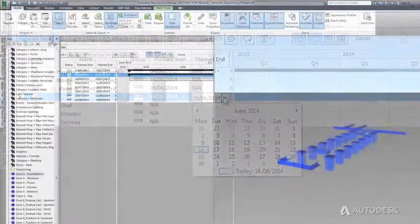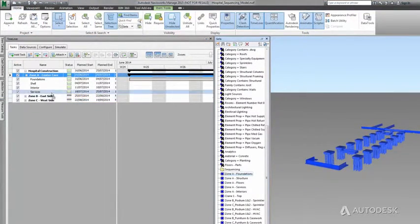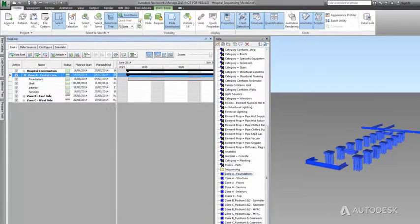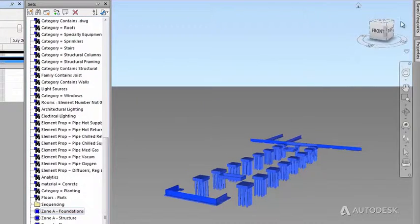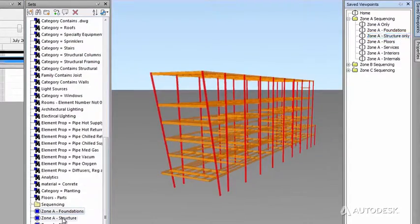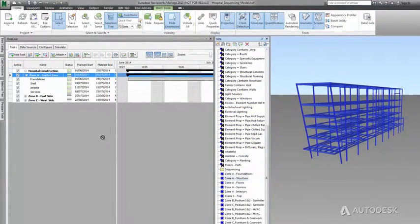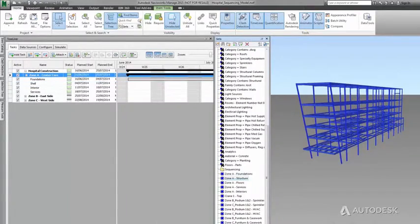You can easily attach model elements, even at a preliminary stage, quickly to the schedule tasks. Elements can be selected from a list, grouped together with selection sets, highlighted on the screen, and dragged and dropped to the appropriate activity.